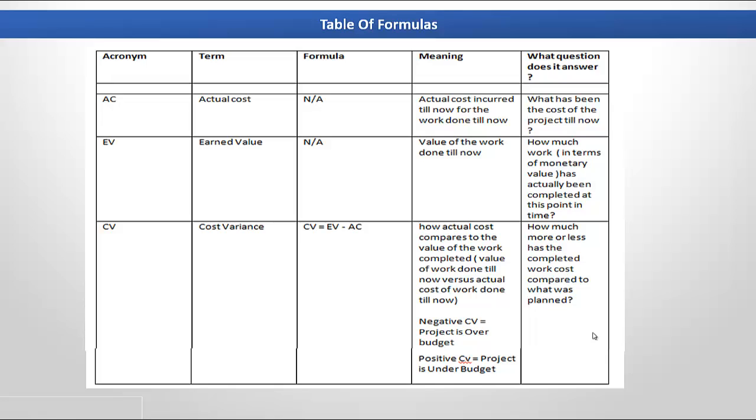Now let's look at what question the term cost variance answers on a project. So if someone was to ask, how much more has the completed work cost compared to what was planned? Or if someone was to ask, how much less has the completed work cost compared to what was planned on the project? Cost variance would give you the answer to that.